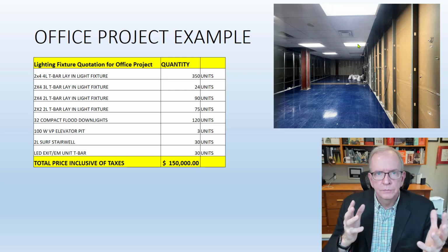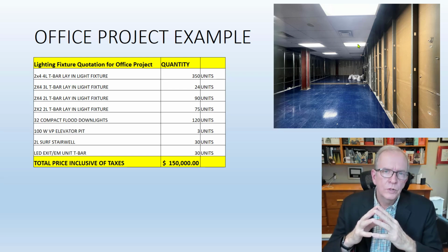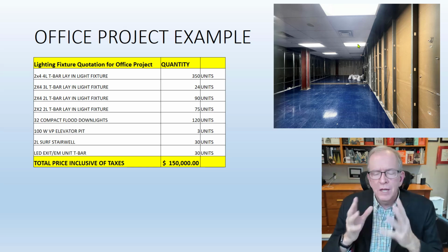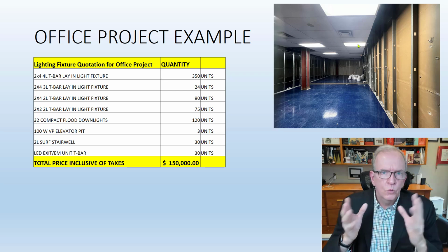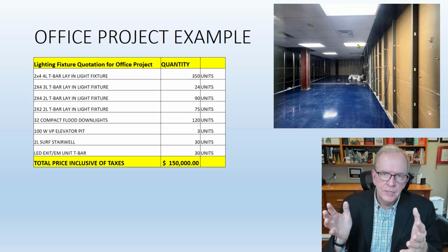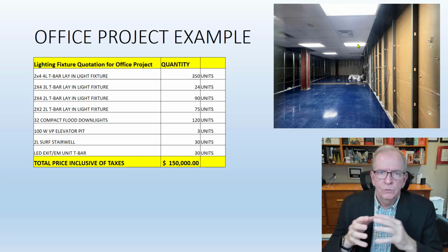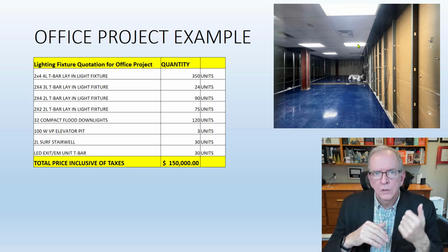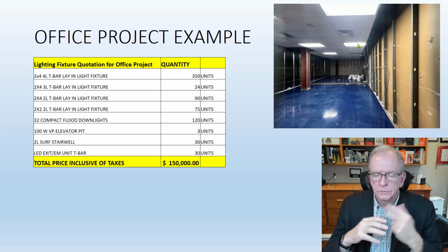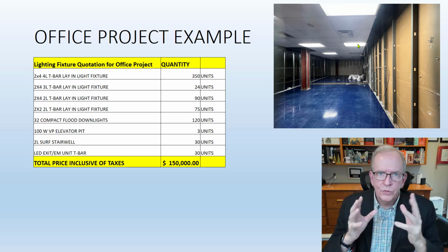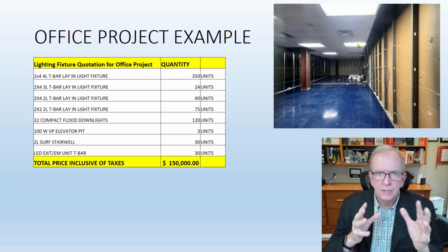Could stuff be stolen? Are you going to have to move it more than one time? Every time you move it, it takes people to move it. If there's not space, are you going to rent space to store it? Are you going to rent some sea cans to put it in? How many sea cans would you need? What would be the cost of that? What would be the cost of the extra movement? Could it be stolen? Could it be damaged? Moving it multiple times, the labor costs of that. These are all things that you need to look at in this particular situation.